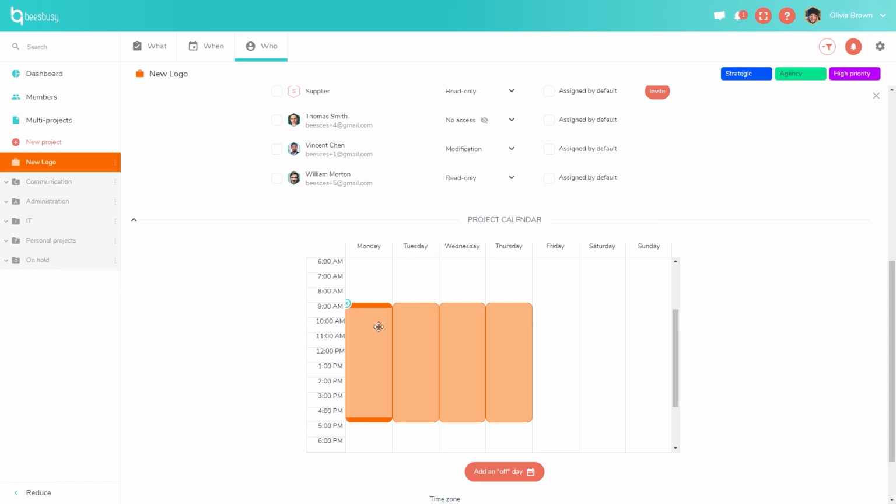and then it will go back to the following Monday. So your task will start on the Monday and end on the following Monday because you have a 5 days duration. You can also resize your blocks if you want, and you can create, if you want, for example, to take into account that you have a lunch break, you can just create different blocks here.